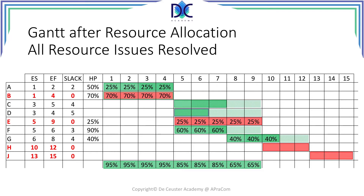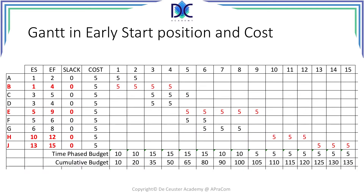You've finished the exercise. Let's have a look at my result and compare it with yours. Here is my solution — you see the time-phased budget at the bottom with all the activities in early start position, and we can find the cumulative budget at the bottom. The total budget at the end is 135 monetary units.